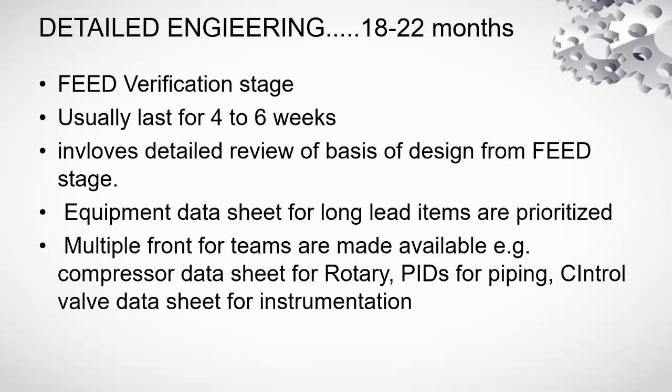But yes, at the same time, other disciplines are also expected to review documents generated by the FEED contractor and to try to find out if there are any loopholes in the FEED stage. For example, FEED contractors are most of the time forced to end the FEED stage as early as possible by the end users. So they tend to keep some open points. They tend to keep some loopholes in the documentation.